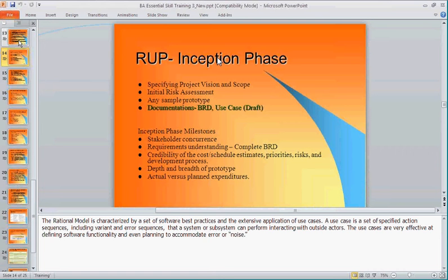Are you clear? You are not supposed to go into the next phase until you have updated your timelines and estimates and whatnot. So if an adjustment is required, then you need to go into another iteration. Are you clear?